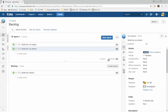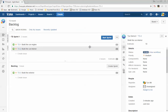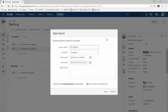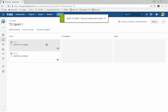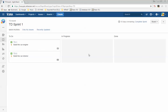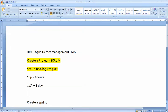The scrum master knows how many story points a team can complete in every sprint. I'll assume this team can do 15 story points per sprint, which is why we have two stories in this sprint. Once stories are in the sprint, click Start Sprint. Jira asks for the sprint name, the duration — we'll set two weeks — starting today and finishing in 14 days. Press Start and you can see the sprint dashboard with the two stories ready to work on.